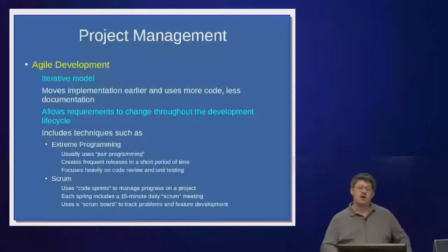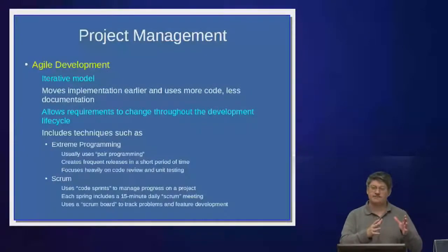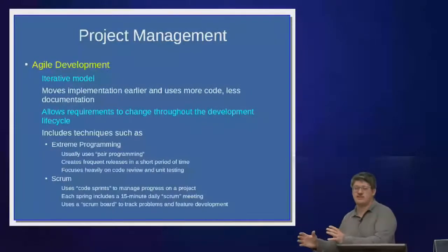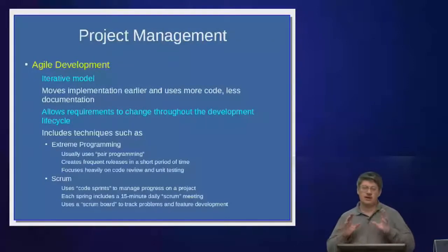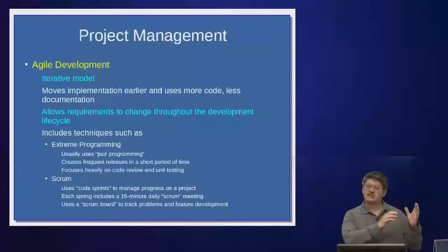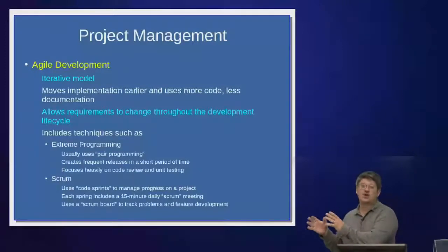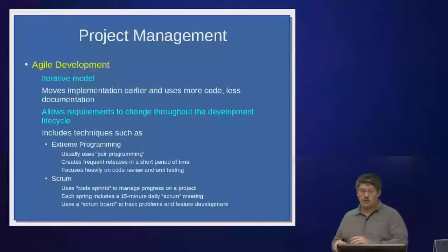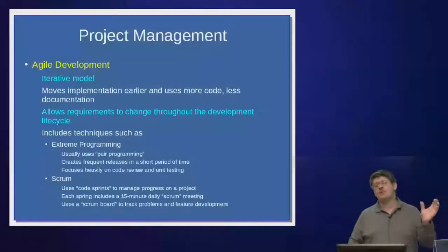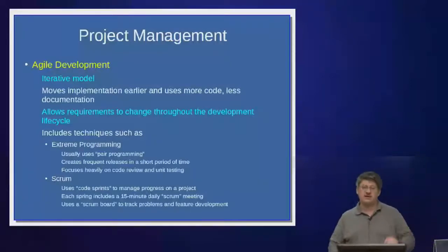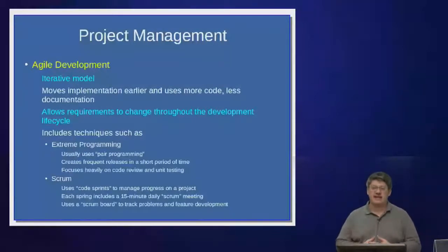With Waterfall, we set the requirements early, but then they don't change through the rest of the development of the project. We kind of have this contract that says we're going to build a website like this, and that's what we come out with. And if the user says, oh, but that's not what I really meant, we say, tough, this is what we agreed to do. With Agile, if the user says, oh, but what I really wanted was a red button, you can change it to be a red button. And so it's much more responsive, and development happens much more quickly.